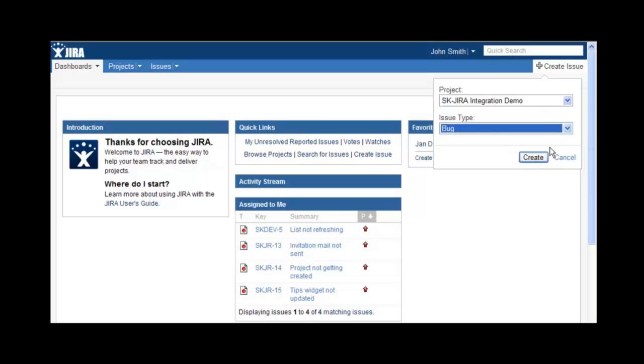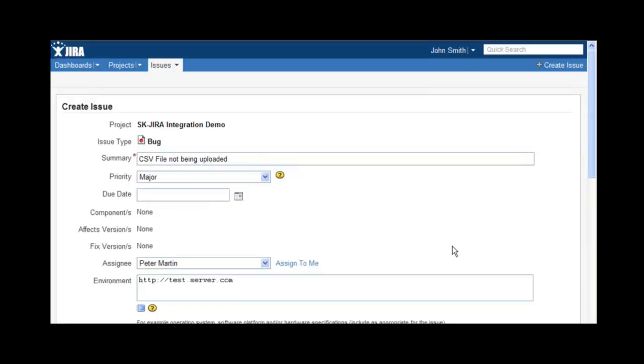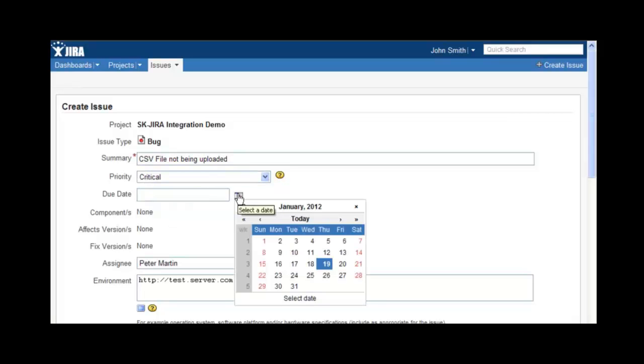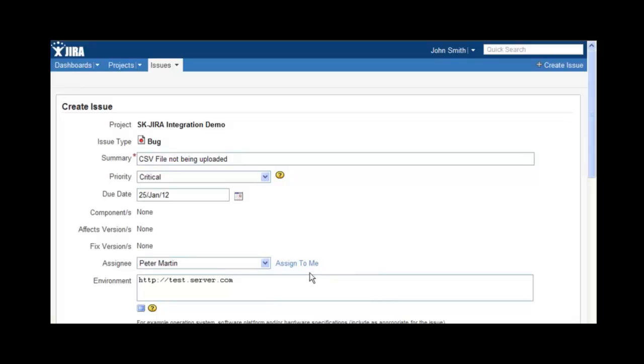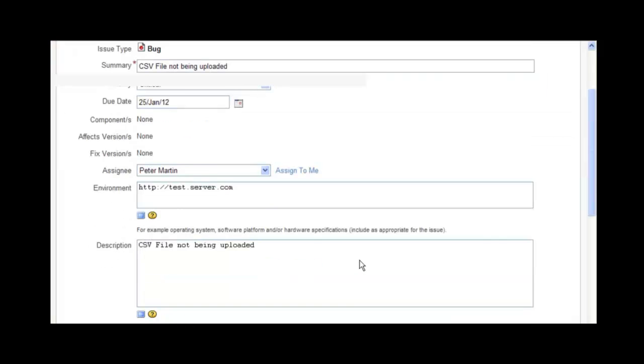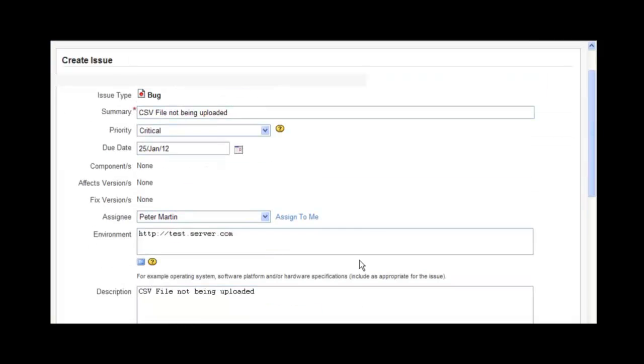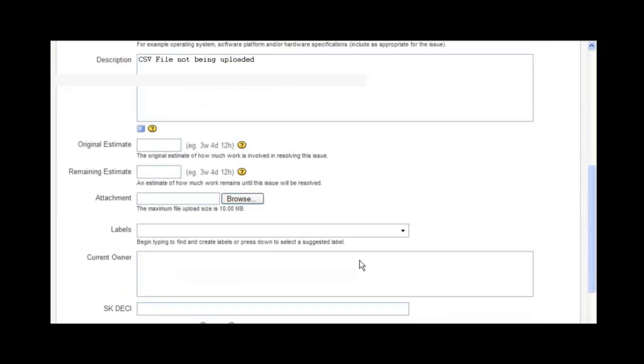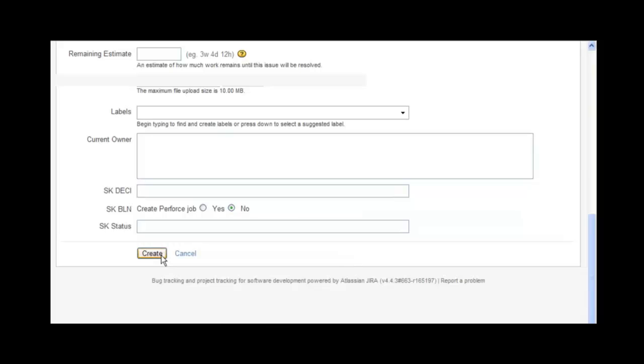Let's create a new defect and see how it appears in SwiftKanban. In this example, a tester John Smith logs a defect in his project. John enters the defect summary and other fields like priority, the due date, assigns it to the developer and submits.